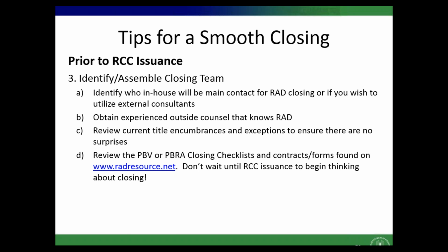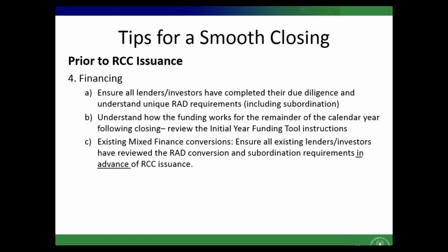Your closing team, I would really urge you to be sure that you have a counsel who can help you, and to look at your title as early as possible, and also find your declaration of trust and look at your legal descriptions, because sometimes it's clear that there's going to be problems. Financing: if it's mixed finance conversions, it's important to talk to the lenders from the original mixed finance and be sure that you're going to be able to do the changes that you need for the RAD conversion.